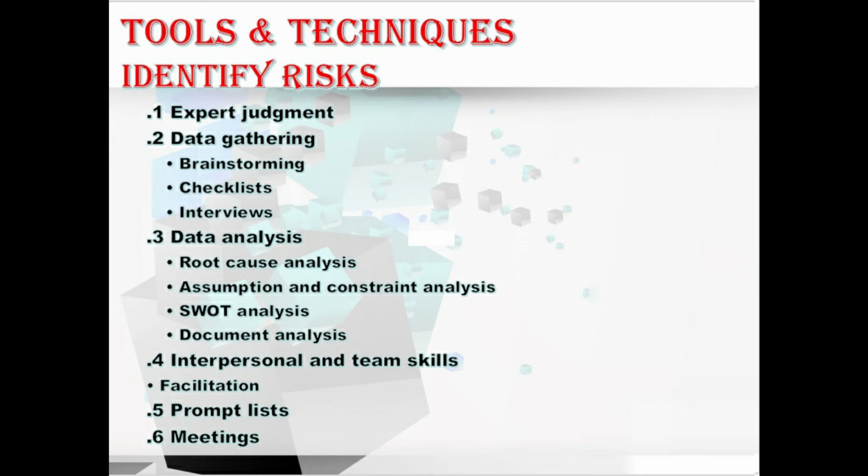That is, the threats may be identified from the inaccuracy, instability, inconsistency, or incompleteness of assumptions, and the constraints may give rise to the opportunities through removing or relaxing a limiting factor that affects the execution of the project or process. Hope you understood about this assumption and constraint analysis technique.